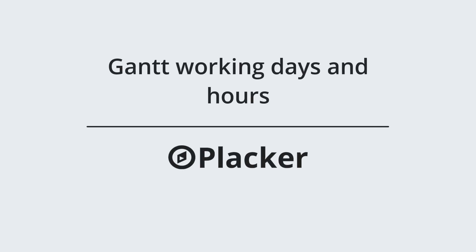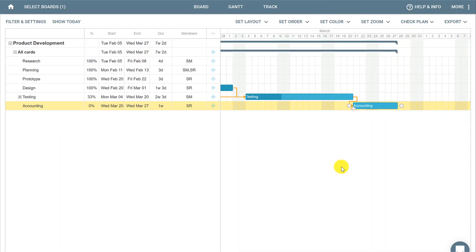In this video you'll learn more about Gantt working days and hours in Placar. Placar has some predefined settings such as working days from Monday to Friday and working hours from 9 a.m. to 5 p.m.